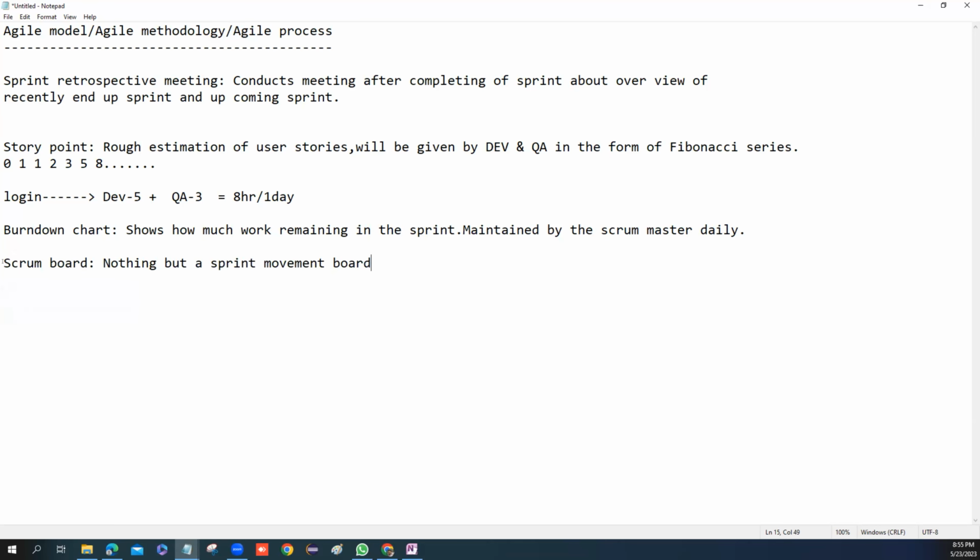He or she can explain how they define it. Is 8 for a week of work or more than a week of work, or is 5 for 2 to 3 days of work? So now let's consider they treat 8 as a week of work. How many days do you need to work? That means 5 full days of work is equivalent to 8 points of one story, right?